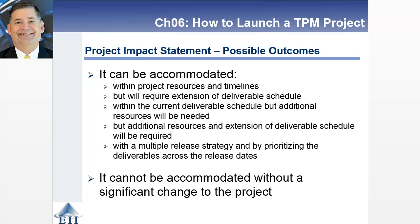There are really two outcomes of a project impact statement: can the change be accommodated or not? If you accept it, can you do it within the project's existing resources and timelines, or will you need to extend the schedule, add resources, or both? You might also move to a multi-release strategy — an incremental approach where you release different versions according to a plan. You have to work through the impact statement to figure out what you're going to address.